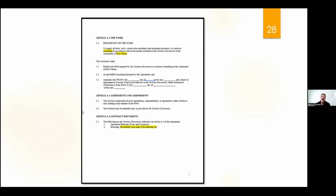Yeah. And then we get on site and he says, you said you were going to do granite countertops. And I said, well, no, I didn't say I was going to do granite countertops. I said, that would be nice. So again, here we are signing the contract. If granite countertops are in this thing, doesn't matter how many times I talked with the chief about it over dinner. If it's not in these drawings and if it's not in the specifications, it's not in.